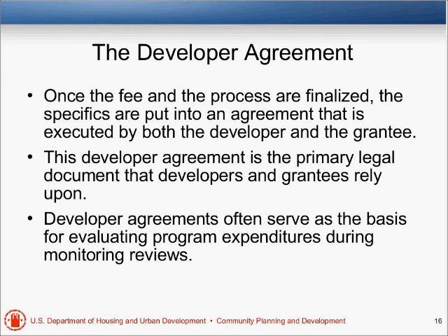As we note here, developer agreements often are the basis for evaluating program expenditures during monitoring reviews. So if you pay for something that's outside the agreement without a revision to the agreement, or if the agreement calls for the developer to do something that isn't done, it's likely that this is going to show up in a future monitoring report.